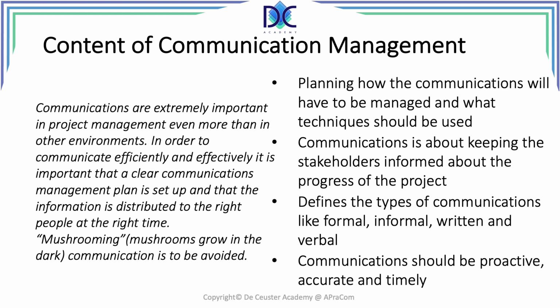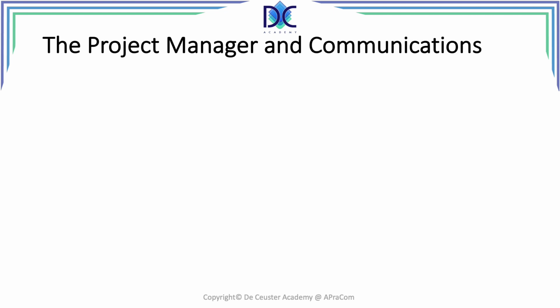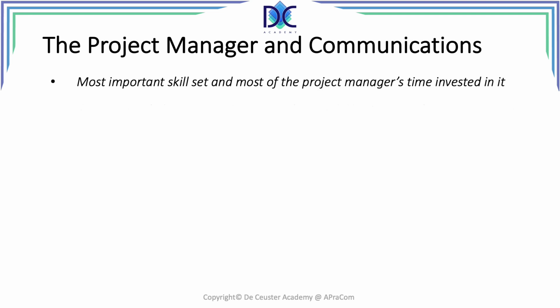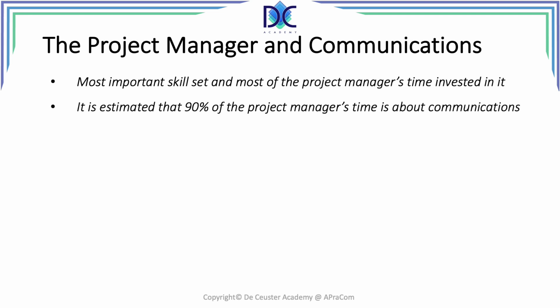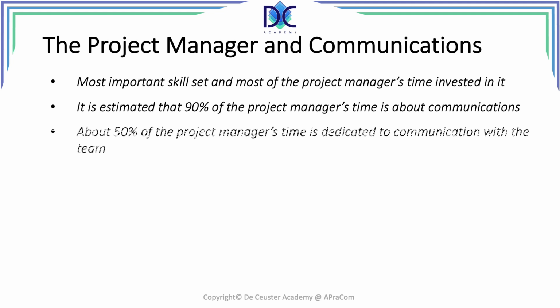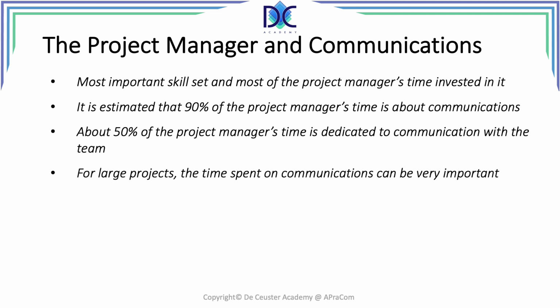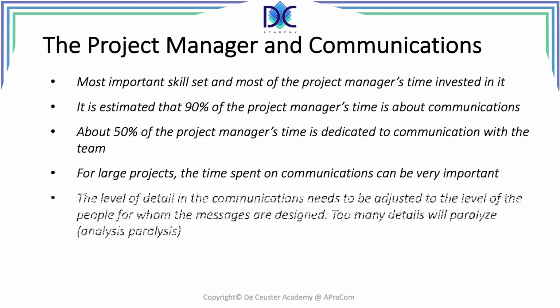When we look at the project manager and communications, it's the most important skill set, and most of the project manager's time is invested in it. Typically, we can estimate that 90% of the project manager's time is about communication, with 50% internally with the team. For large projects, the time spent on communication can be very important.